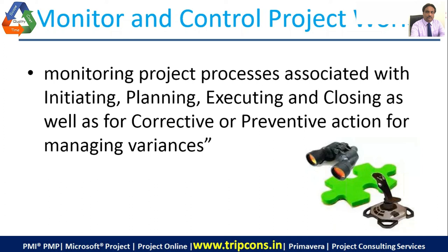Time, cost, work effort. Work effort, that is the man hours that you're utilizing. If you have these three well planned and you have something to compare against, you take the actual values, compare, and you manage the variance.